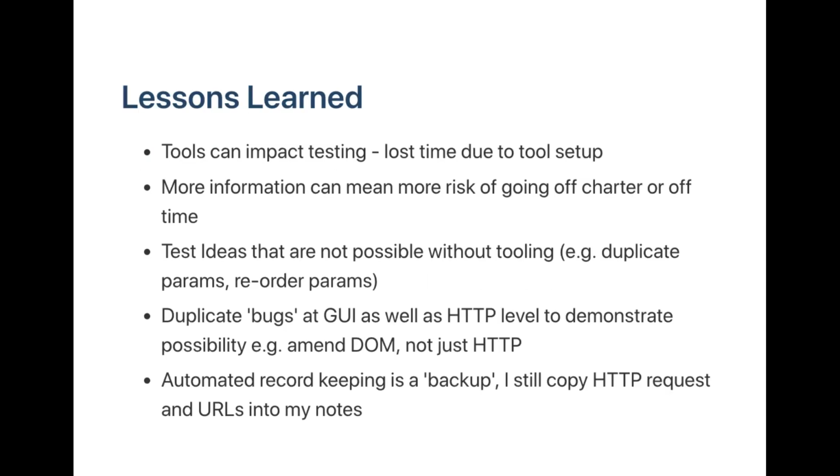In terms of lessons, tools can impose a risk. Every tool that we add imposes some sort of risk in terms of time to learn. Maybe it crashes, maybe there's bugs in that tool. I lost time using Zap because I hadn't used it for a while, so I had to set up the certificates, had to make sure it was working on Mac, had to try and get it upgraded to the latest version. So it cost me some time. And that's the kind of minimal impact that tool has just in terms of startup.